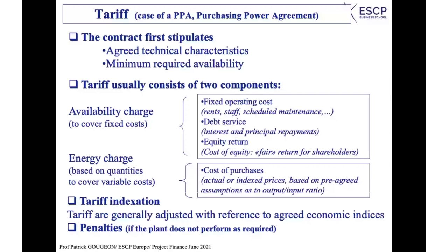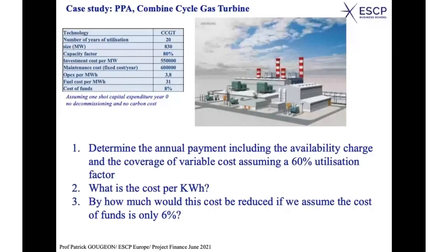And it is absolutely necessary, okay? It's because we have PPAs that we can have project finance with 80% or 70% of debt financing the project, because you have this high level of security for the revenues. So let's have a kind of case here, just to be a bit more precise on that. So this is a gas power plant with real numbers.